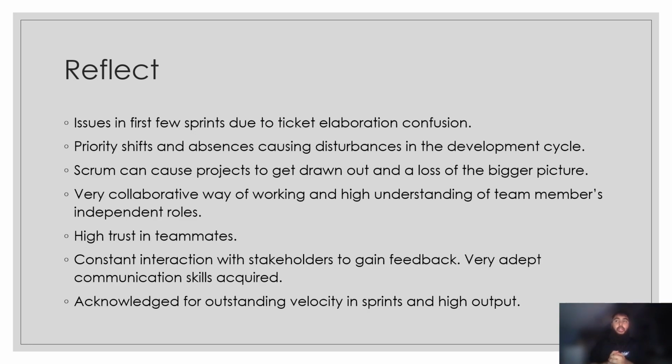I wasn't tracking those, which meant that I often had to go back and retroactively change the sprint goals and sort of scrap work or stall work entirely, to make sure that the sprint goals were met and that we were being able to complete sprints and not overworking the team.